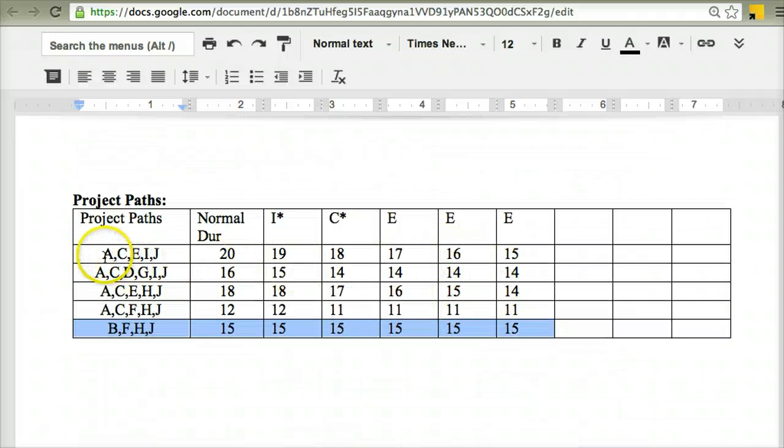And again, I'm just going to focus on those two paths. So E is on the first, our original critical path, and so that would reduce by 1 day from 15 down to 14. And B is on this new critical path, so that also would reduce from 15 down to 14. And so therefore, the overall project duration would reduce from 15 down to 14, and I would get my extra day's bonus. So that's another option.